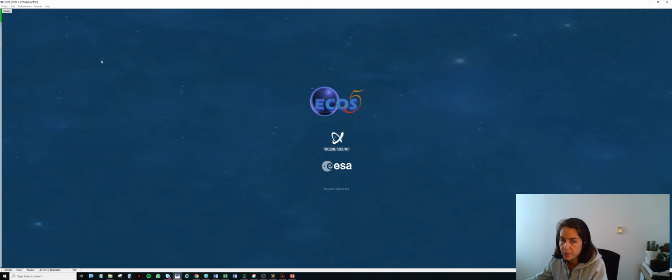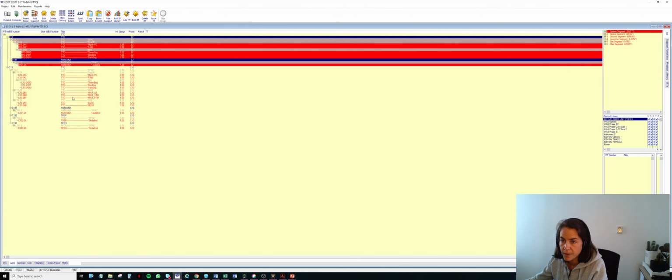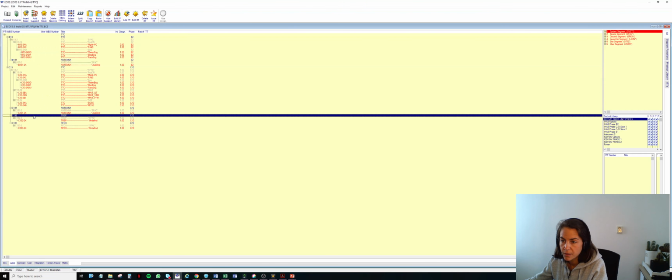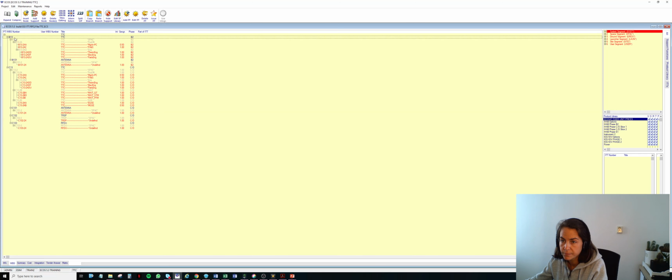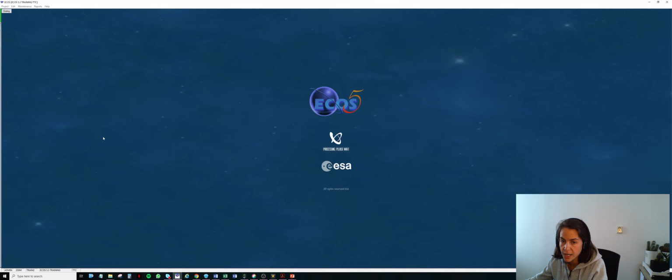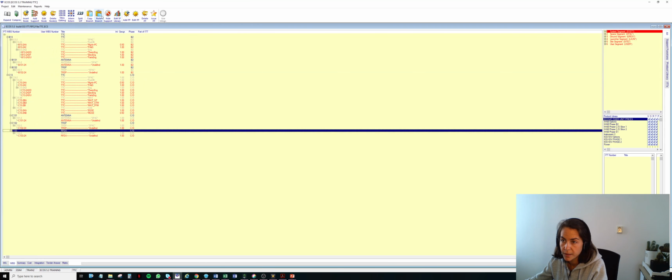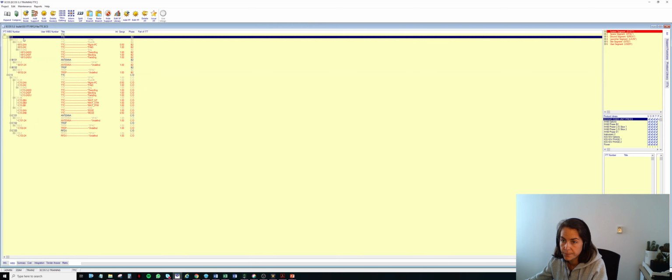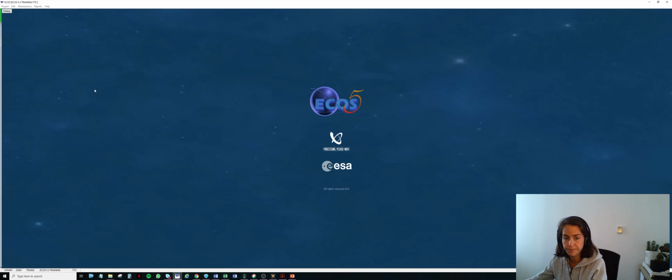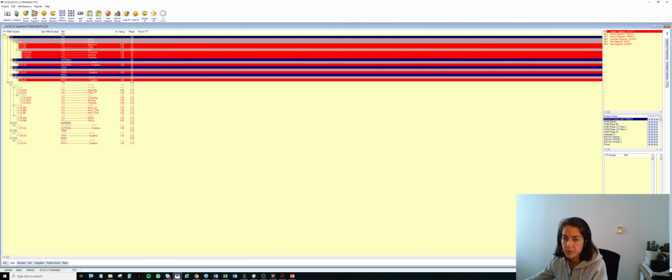You see, it's a matter of practice. Transponder. So from the child node, I copy it under the parent node. So here, copy, and here, paste. So you see, I was able to build quite quickly my product work breakdown structure for the TTNC.